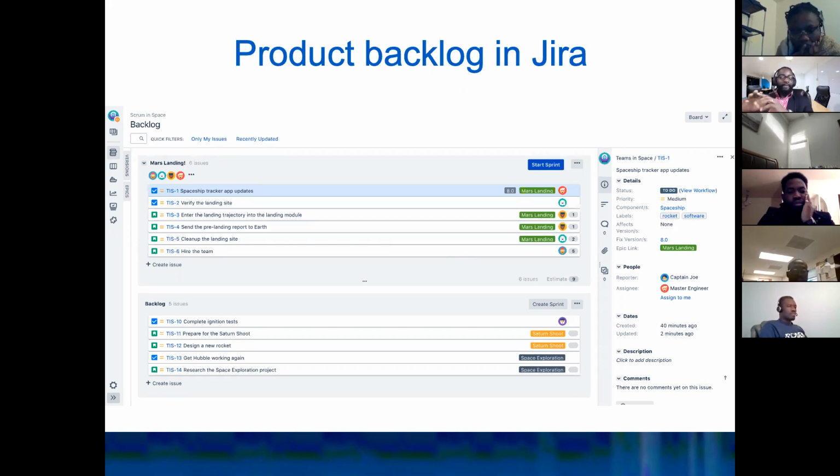The product owner can even break down those product backlog items into smaller items as we're doing the refinement. So don't think that everything you have in the product backlog is clear and that what is left there is all you have to do. No, it can be added, it can be modified, it can be deleted. But with the approval of the product owner and the product owner only.